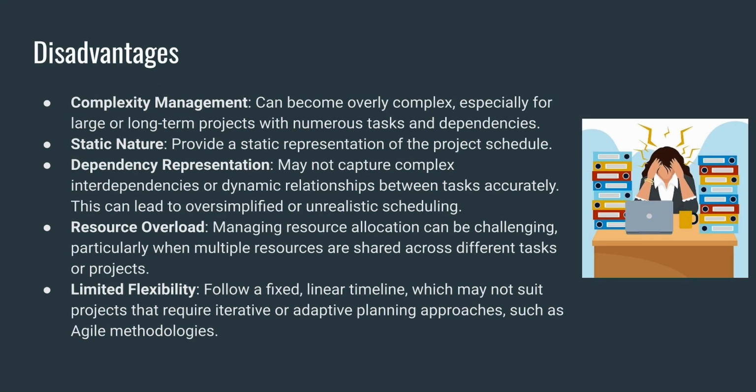Here are the disadvantages of a Gantt chart. Gantt charts can become overly complex for long-term projects, making management challenging due to the multitude of tasks and dependencies involved. It is often hard to plan a project that will take years. For example, I personally, at my work, am working on a project that has been ongoing for about 15 years, and it would be near impossible to create a Gantt chart for that project.